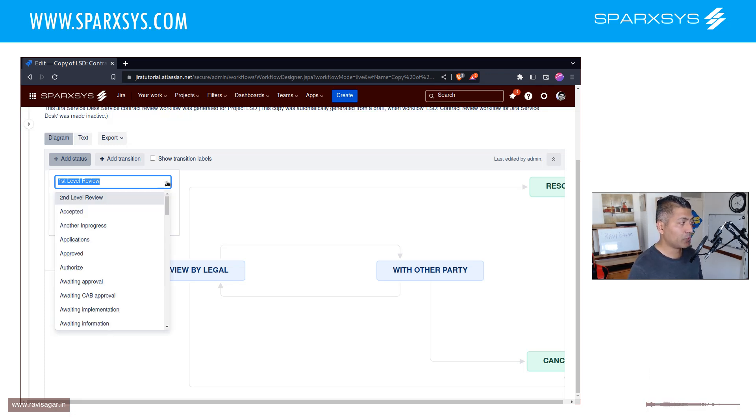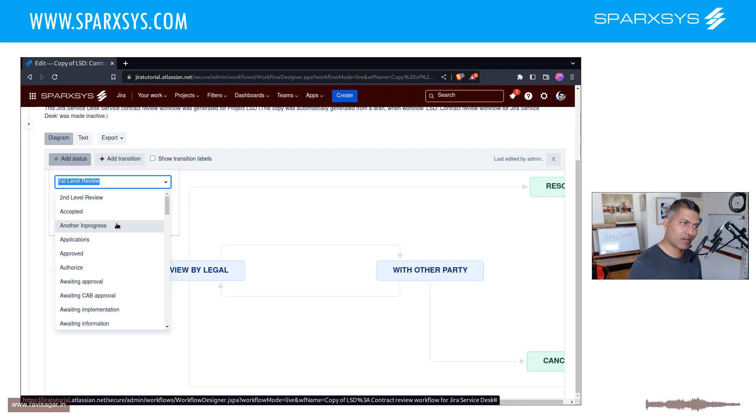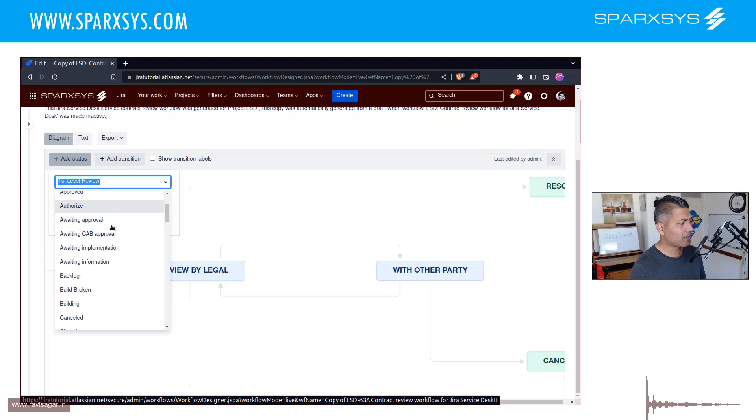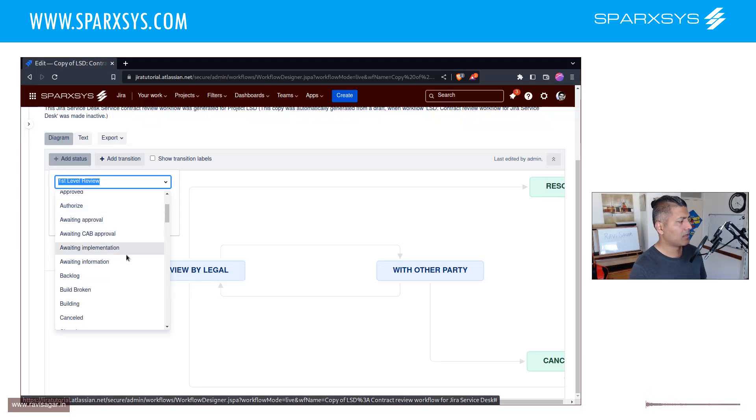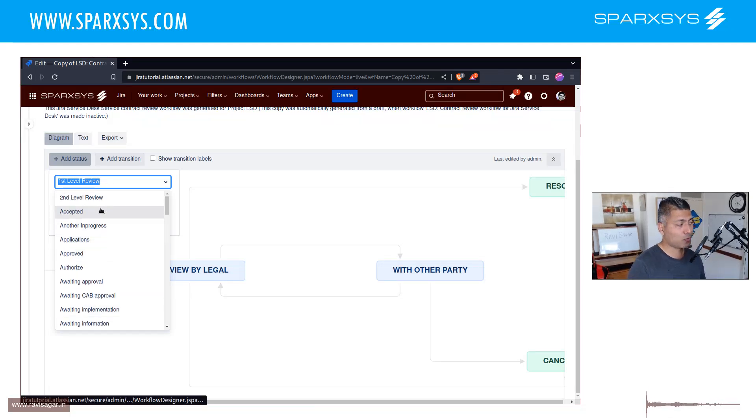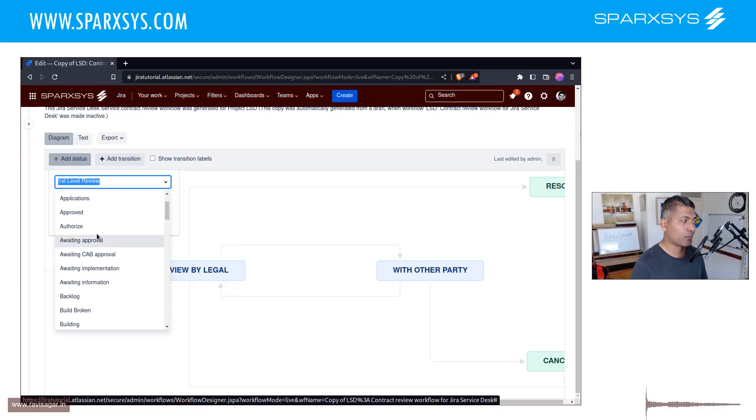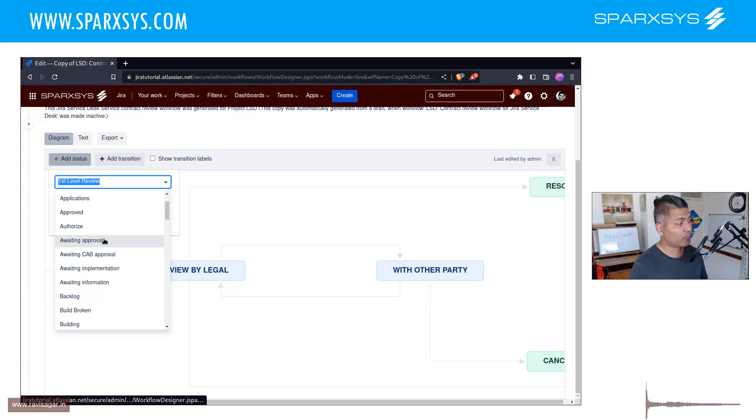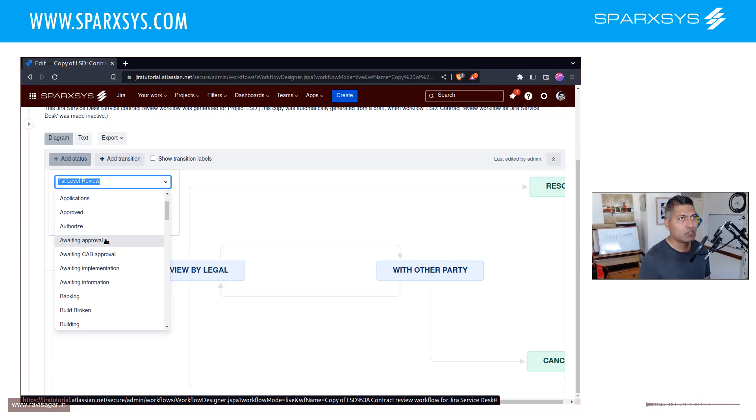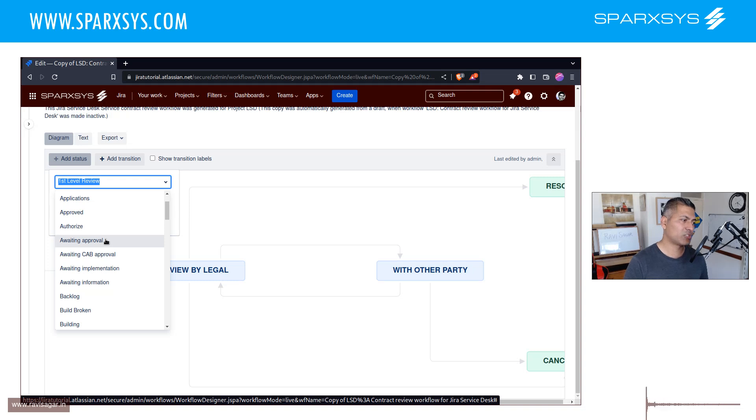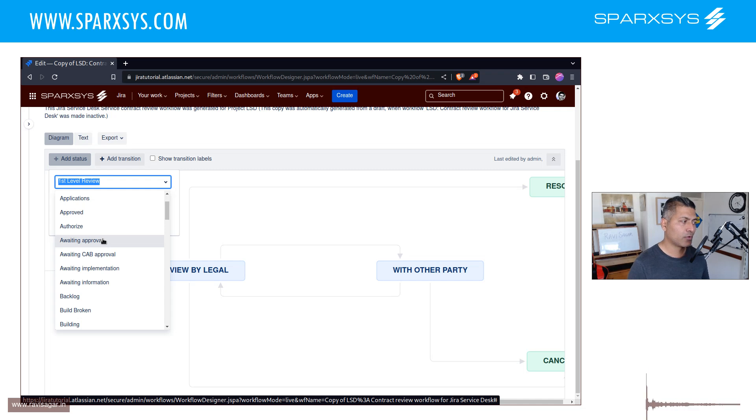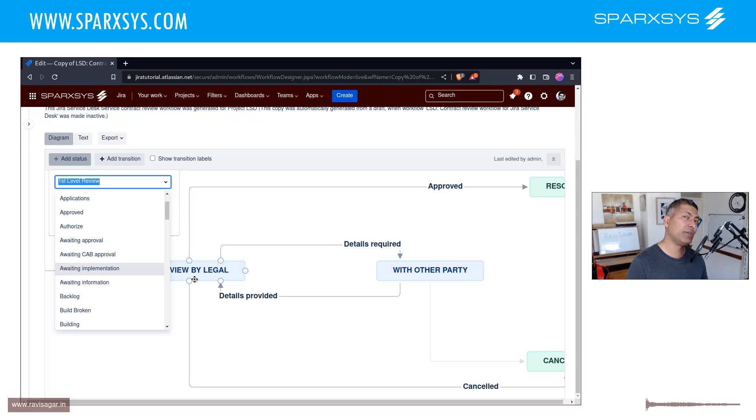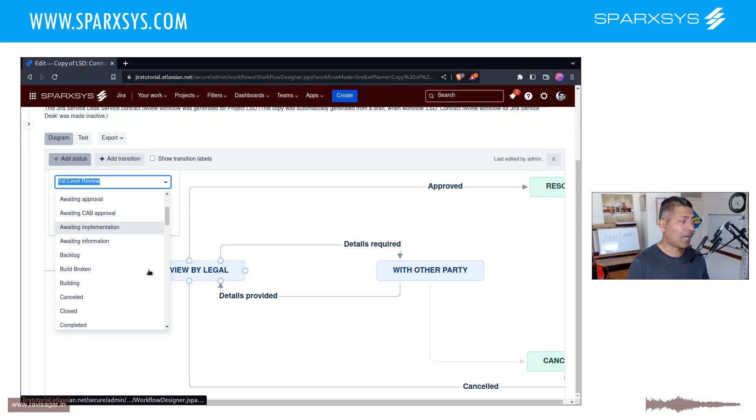So in this case, whenever you're creating a new status, just look at the list first and first ask yourself, do we really need to create a status that says another in progress? I mean, it's a stupid name, right? And approved is fine. Authorize approved, awaiting approval. So awaiting approval might make sense. But the state should not be, as I just mentioned, it should always be something that you can reuse. So if you are using a status like in review by legal, then you can't really reuse the state.